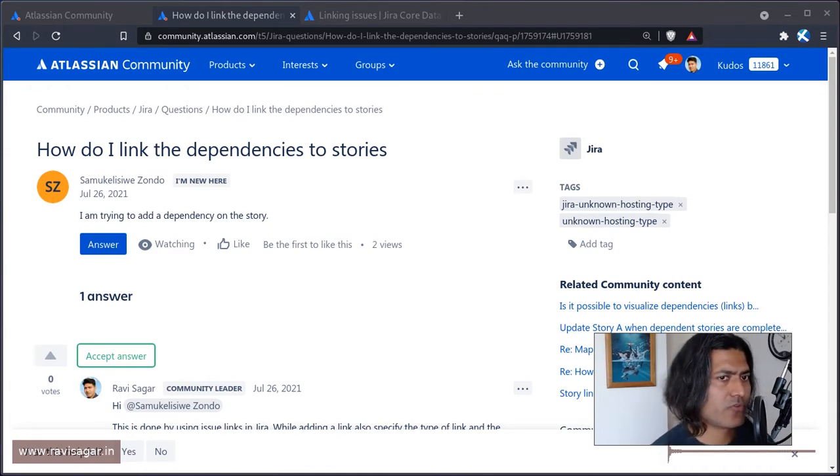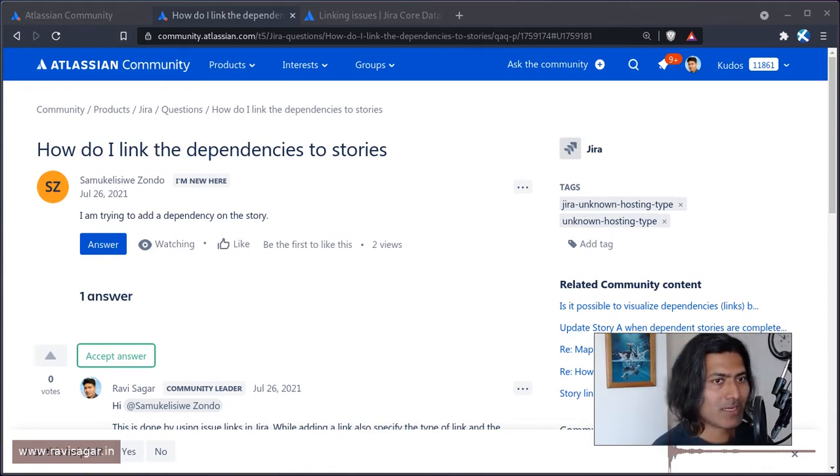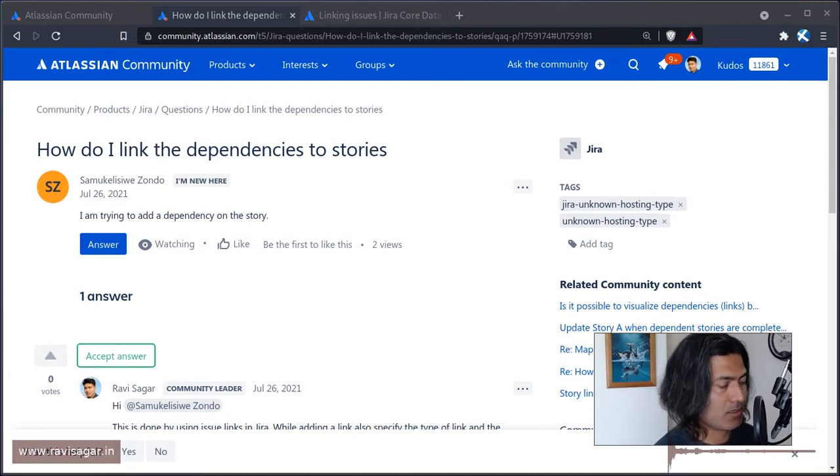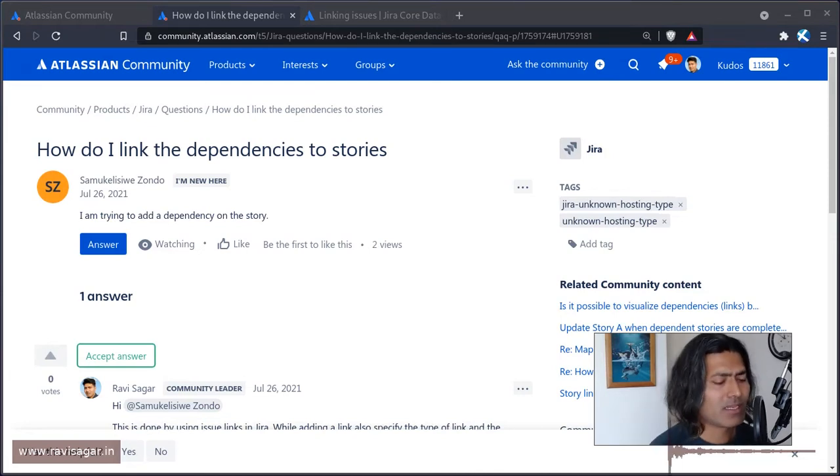And in Jira, there is no such concept of dependencies, but there is a concept of linking. And this is actually managed using issue links. This is again, a very common question.